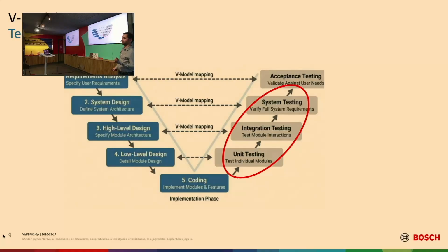What is important is that we have these lines, and it's good from a project management point of view and quality point of view. We have every requirement linked to every test. So at the end of the project, we can say, okay, we have this requirement, we decomposed it to our level or our language, and we implemented it and tested it.